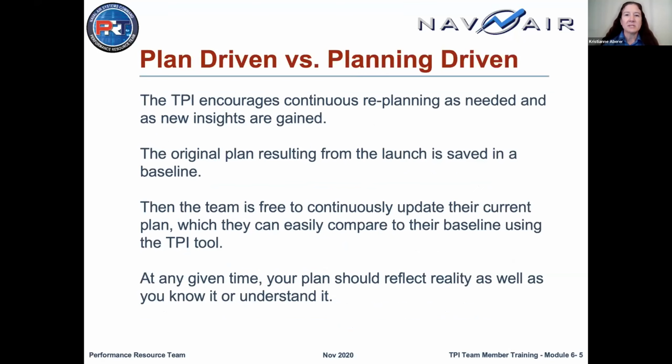So plan-driven versus planning-driven. The main message here is that the planning doesn't stop after the launch. When you learn more, when you realize what you forgot, when your availability changes, you want to replan. With the TPI tool, you can save a baseline of your original plan and easily compare your current plan to it. In TPI, we want project plans to mirror your current reality as well as you know it.